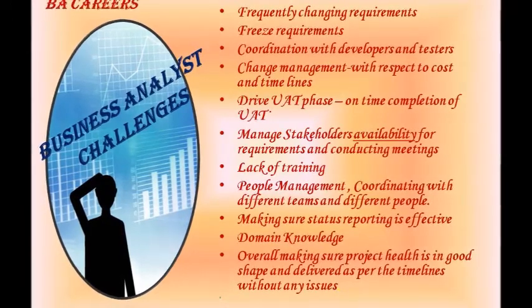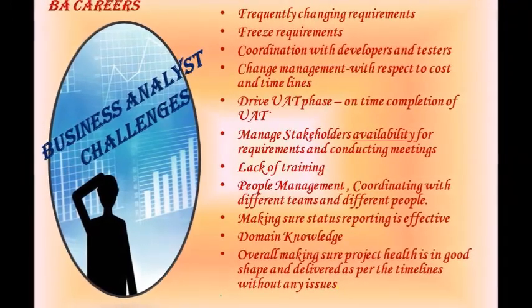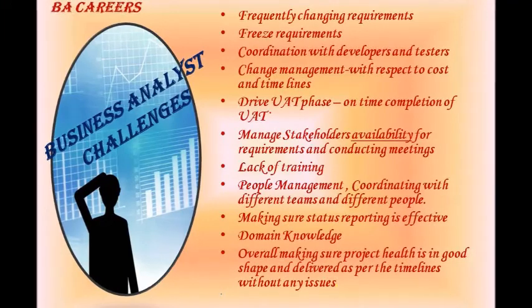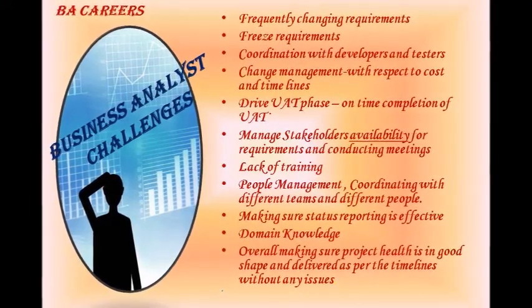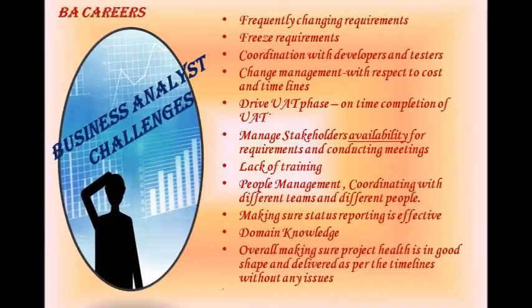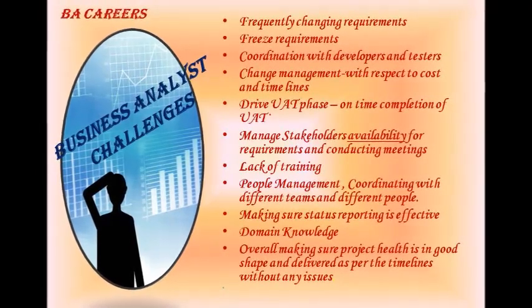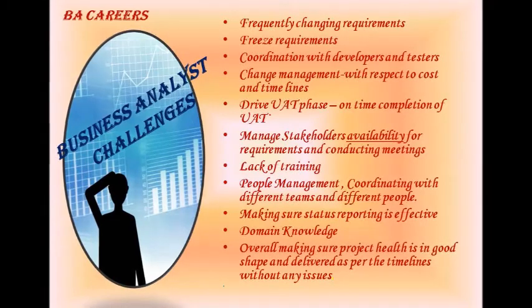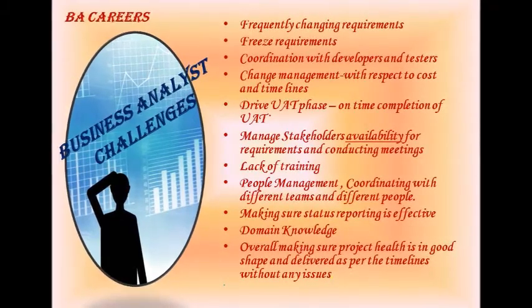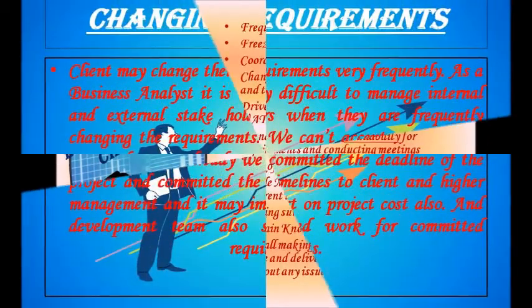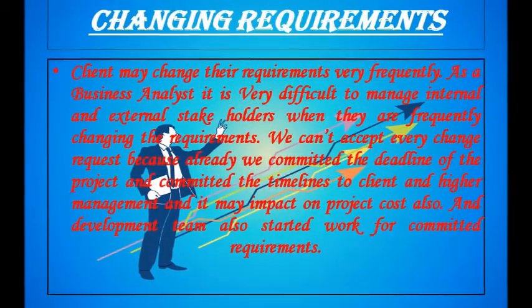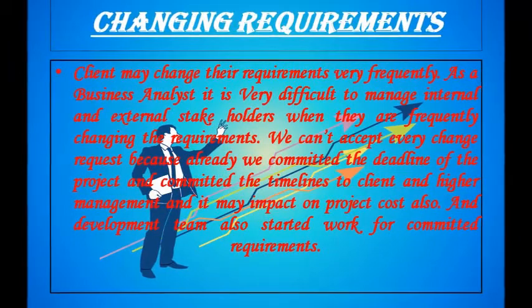Changing requirements. Clients may change their requirements very frequently. As a business analyst, it is very difficult to manage internal and external stakeholders when they are frequently changing the requirements. We can't accept every change request because we already committed the deadline of the project and the timelines to the client and higher management, and it may impact the project cost also. And the development team has also started work on the committed requirements.